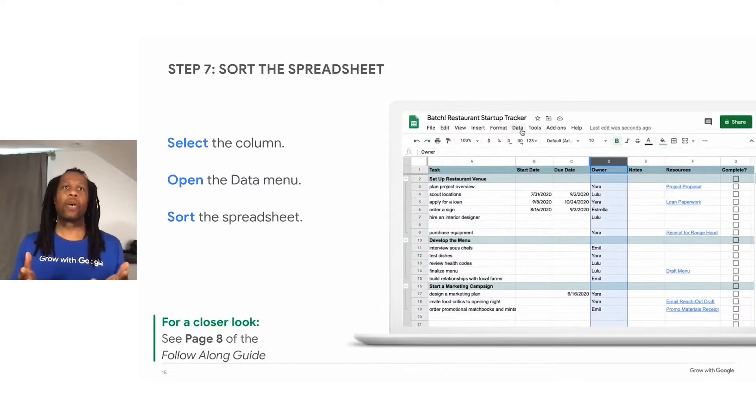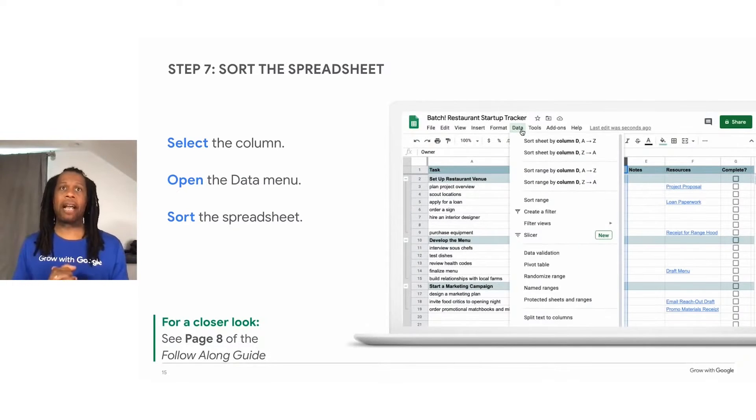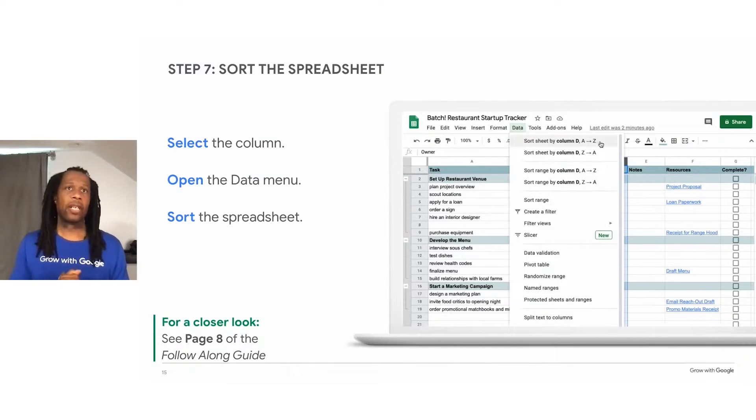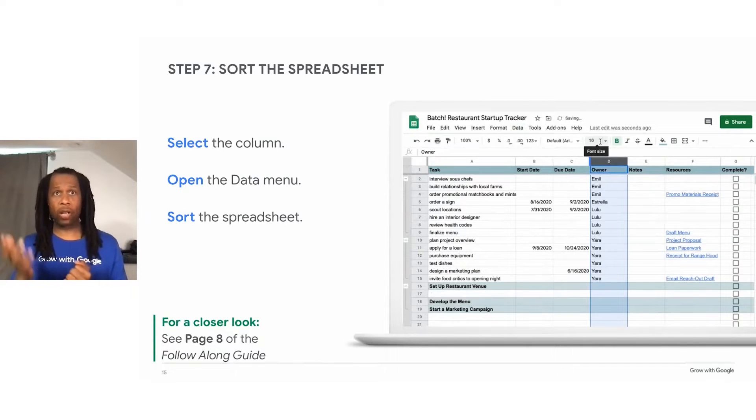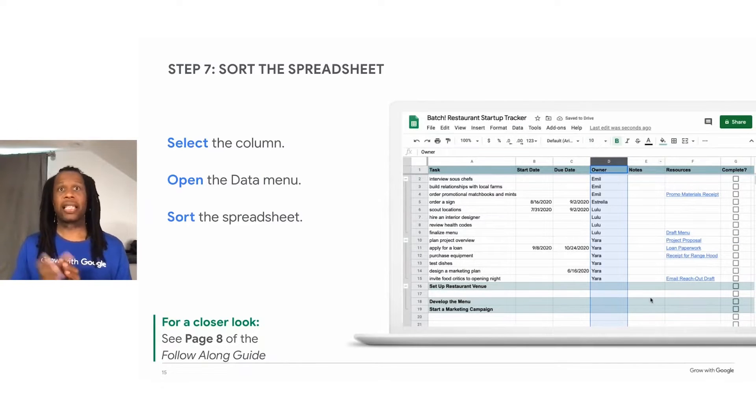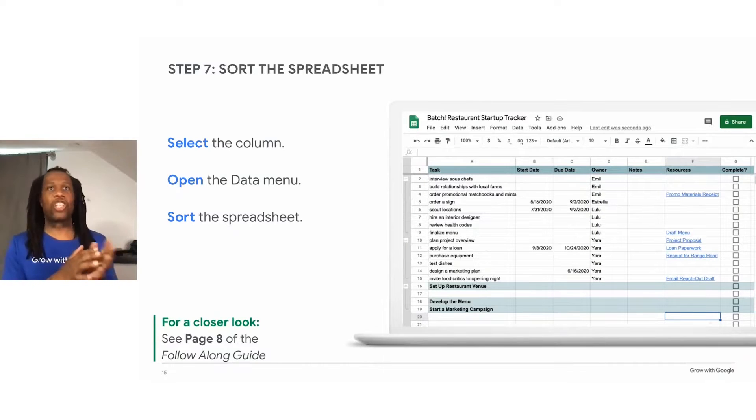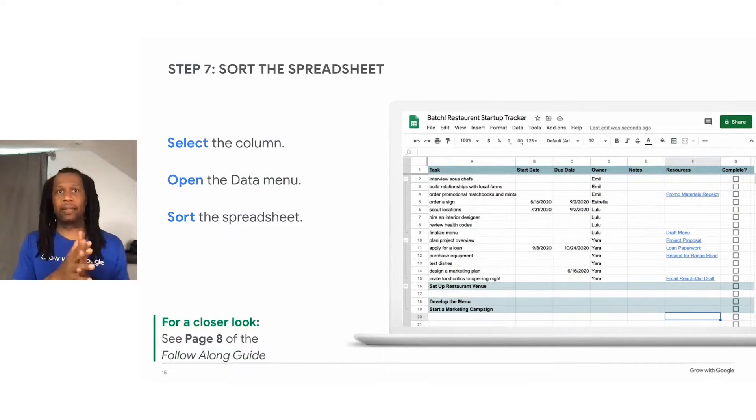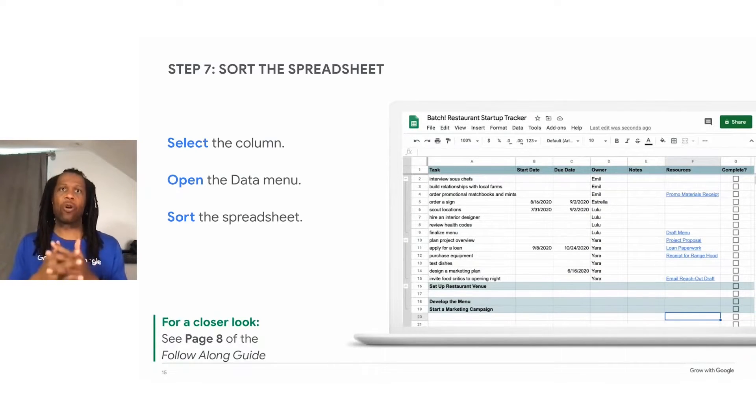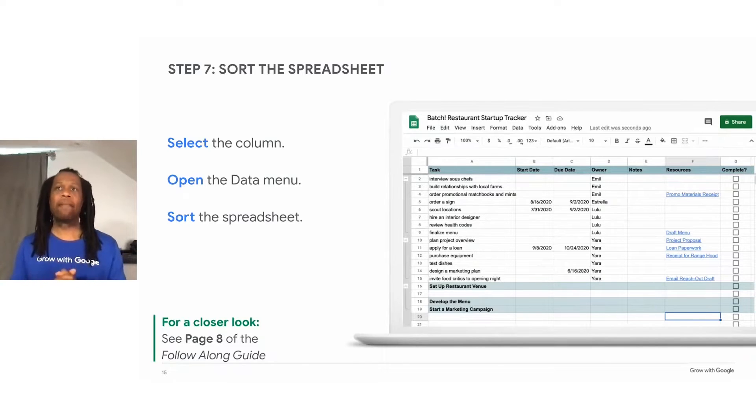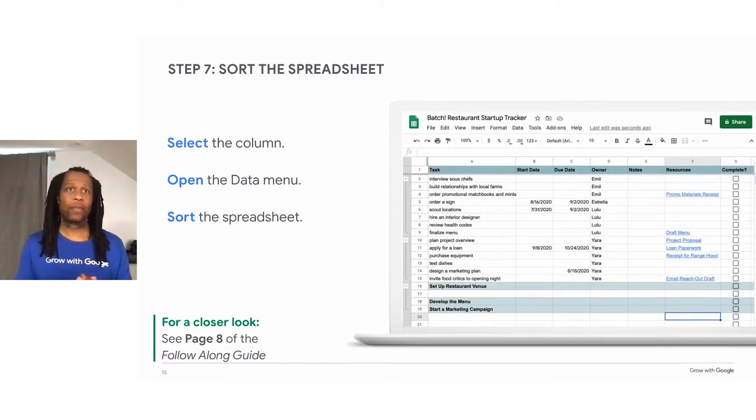First, let's sort the spreadsheet by person to see what everyone is working on. You would simply select a whole column. Now, select data from the menu, and then select sort. You can sort the sheet A to Z. This rearranges the rows by person in alphabetical order so that you can see each team member's tasks all together.